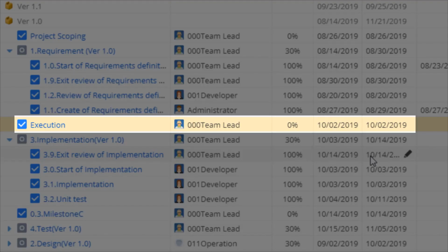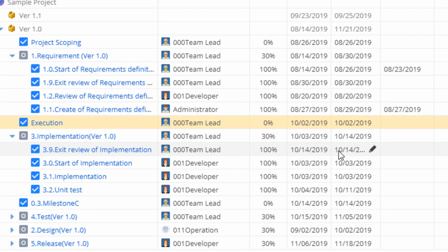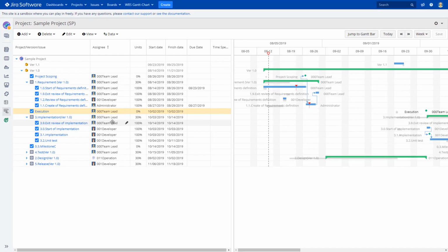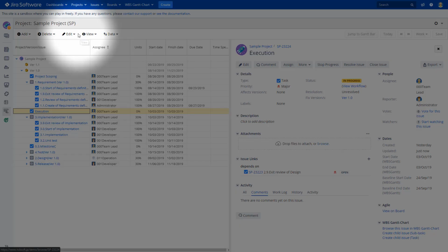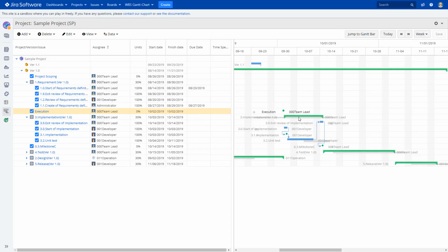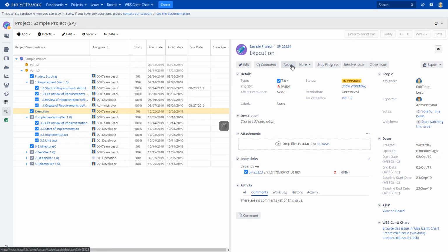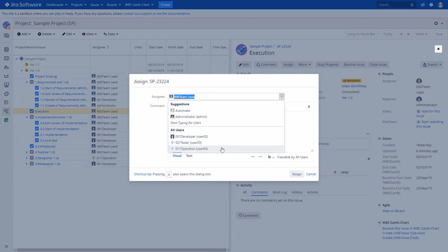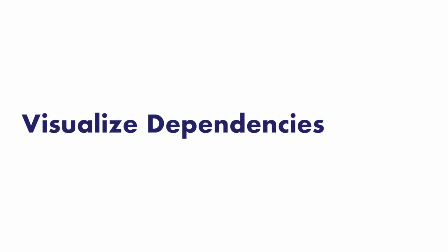A milestone has a fixed end date, but it doesn't have a duration. It describes the outcome or the process. You can simply convert a task into a milestone, just like this. Milestone tracking is essential to maintaining team momentum. For example, if a milestone is being delayed, you need to adjust the resource allocation from another strand of the project to avoid roadblocks. Another critical area in project management that Agile leaves out is task dependencies.